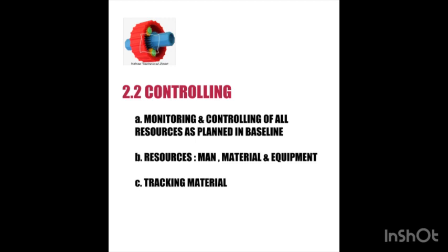The motive is to keep on tracking and maintaining the baseline progress. The baseline progress which is approved by the client, we have to follow that baseline, and against that baseline, whatever your actual progress is, you have to track on a daily, weekly and monthly basis. This will help you closely monitor and control the project at every stage.